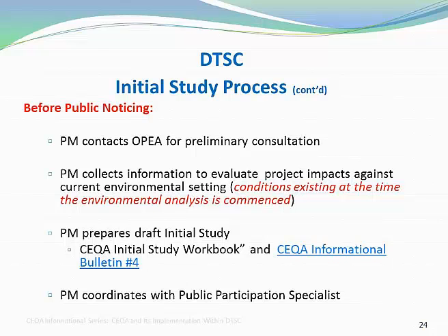Well, there is no 5-day thing. That only applies to the other CEQA documents. The way that the process works under an NOE scenario is that you file it shortly after project approval, and the trigger is 35 days. But if you're dragging your feet, and also it's not only upon approval but also upon discovery.